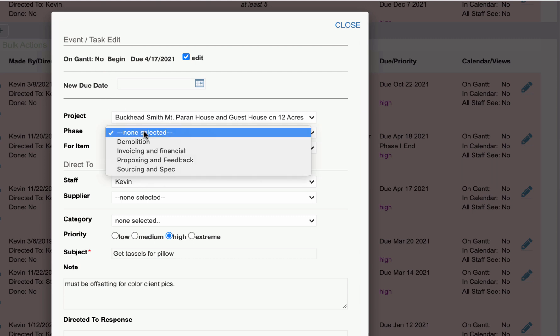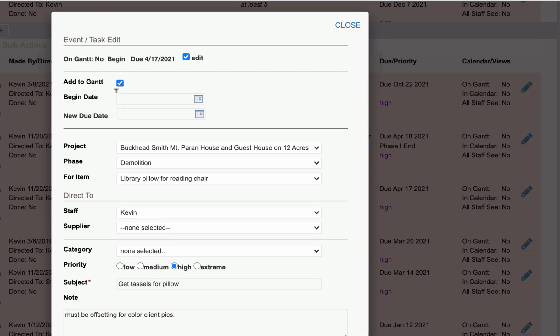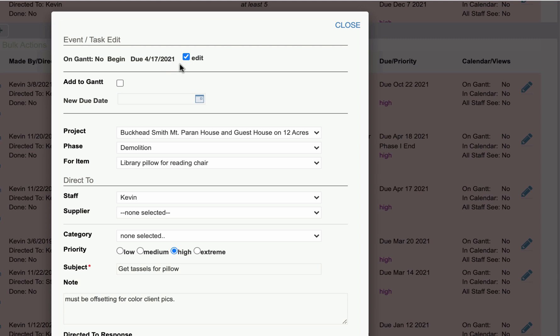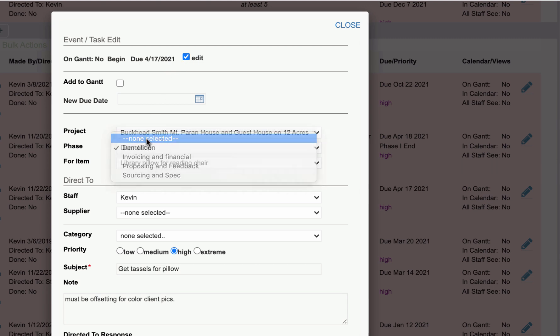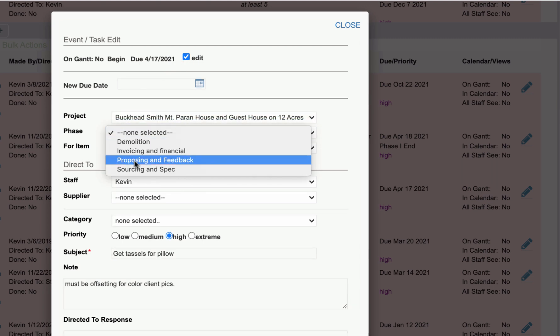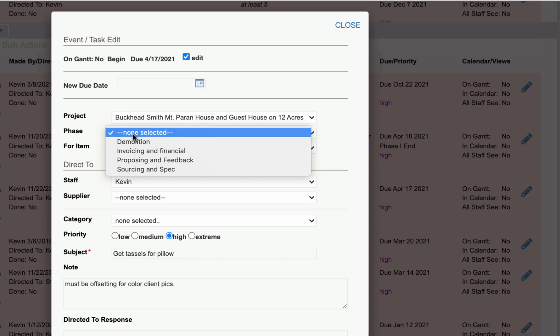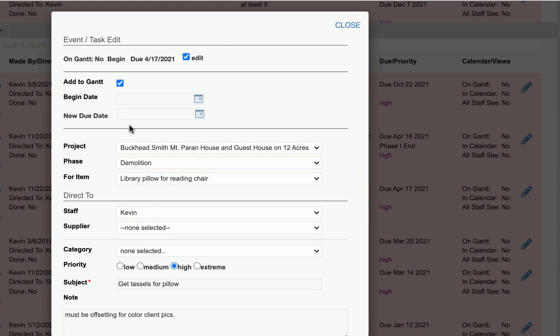But if you put this task on a phase, which is required for the Gantt chart, now you can add it to the Gantt chart and put in a due date and a begin date right here. So you can add an existing task to the Gantt chart, but again, it has to have a phase. So if you open up an old task, make sure you put on a project phase and then you can add it to the Gantt chart like that.